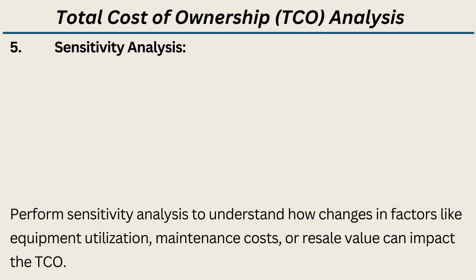Step 5: Sensitivity analysis. Perform sensitivity analysis to understand how changes in factors like equipment utilization, maintenance costs, or resale value can impact the TCO.